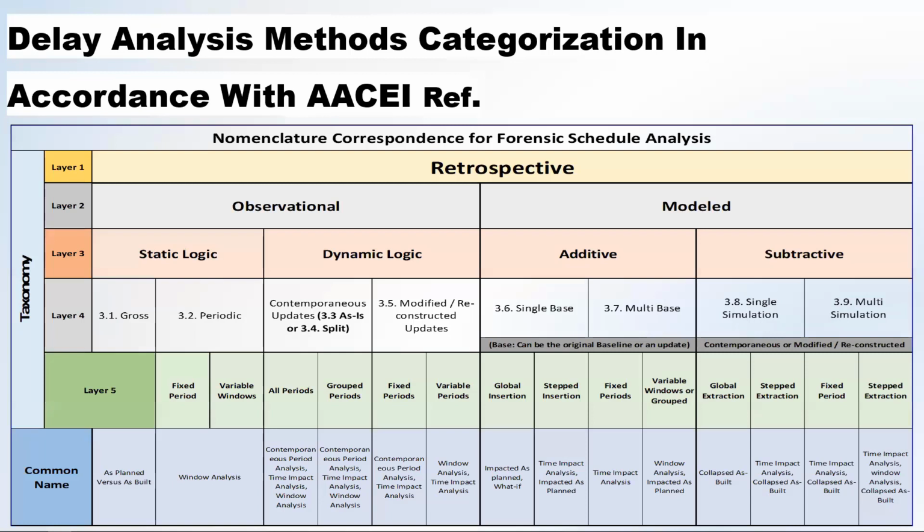So we are in the specific method now, the static logic, dynamic logic, and the basic implementation is 3.1, which we name the method after. In the model, we are using fragments. So these fragments can be added. It's the classical way, doing a fragment and adding it, or you develop an entire new program in the way of but-for.